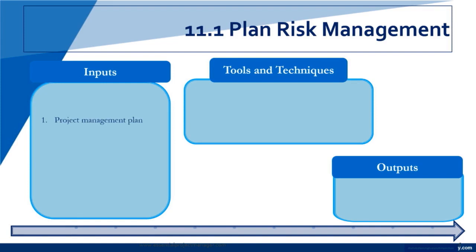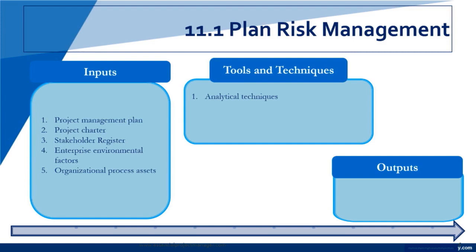There are seven different processes that we've identified as part of this knowledge area. We plan risk management, identify the risks, perform qualitative risk analysis, and perform quantitative risk analysis. We plan the risk response, and new to this particular version is implement risk response. Then we control risks as part of the monitoring and controlling process group.